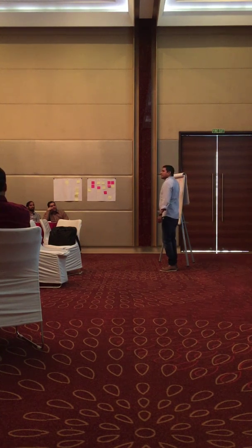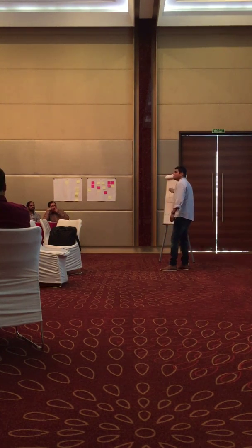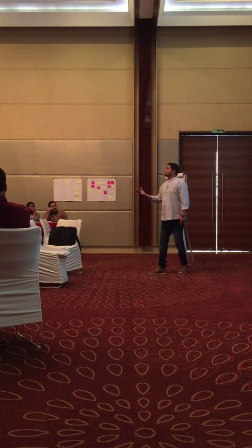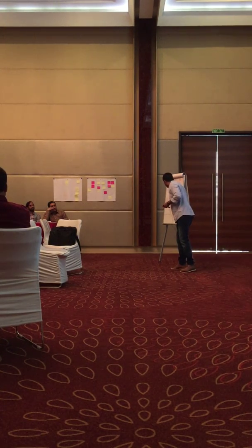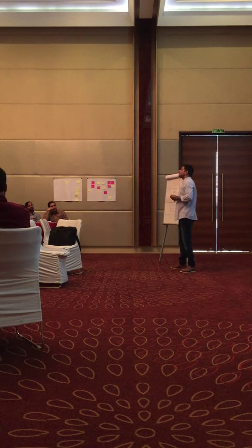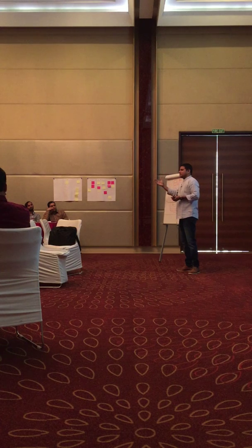The second sprint, he may come up with another story. As a registered user, I want to update my billing address. Another 4 to 5 fields. I want to update my hobbies. Another 4 to 5 fields. This way, we are vertically splitting, which will go through all the phases of software development, starting from analysis till testing, and then the review will be done by the product owner and handed over to the product owner in the review. Right? So there are multiple splitting concepts you can consider.